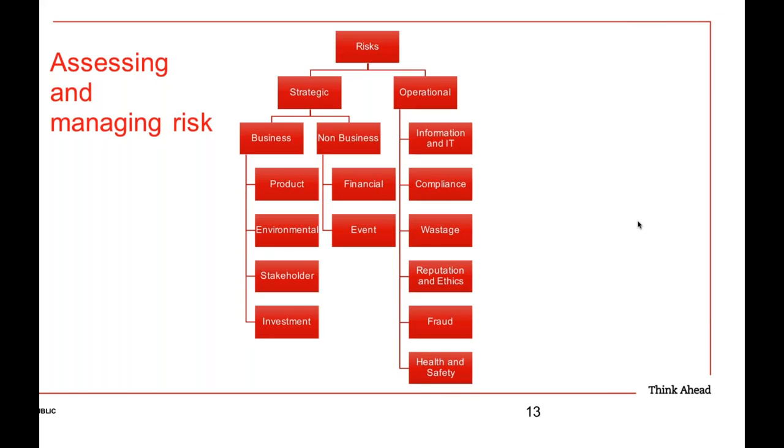That's the reason why you map it. Some people use a heat map. A heat map is basically having your risk tolerance as a boundary, and then you look into the impact, that is the severity of that particular risk if it were to materialize, and then the likelihood or the frequency of that particular risk to take place.